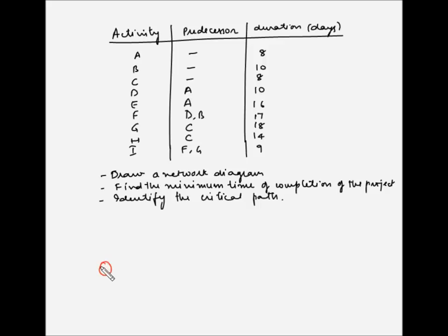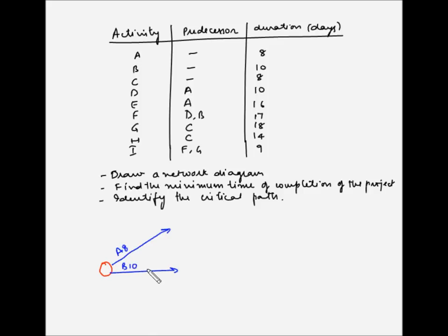This is the starting node. We have been given that A, B, and C do not have any predecessors, so these will start from the starting node. Activity A takes 8 days for completion, B takes 10 days for completion, and C takes 8 days for completion.